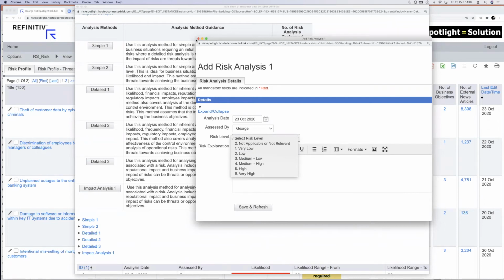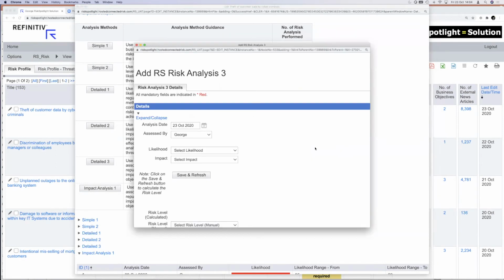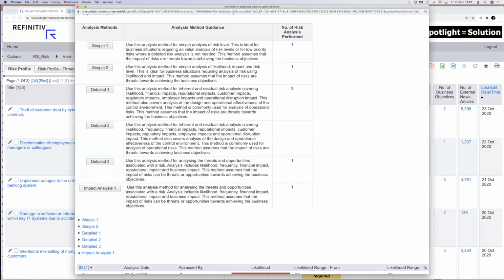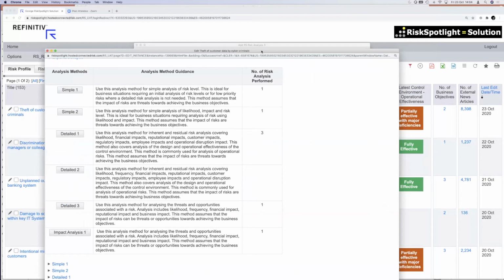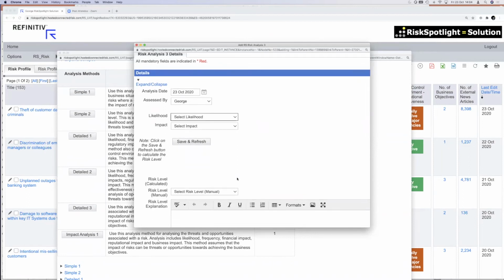So that is one approach, because they're not going to go and do the minor, major, catastrophic for that simple case. Then you can give them, if they want a little bit more, so if they want to capture the likelihood and impact, which is what happens on most of the IT projects, where from an IT project perspective, we're capturing the likelihood and the impact. So in this case, we say, okay, you give your likelihood and impact, and then those can be multiplied, you get a number.